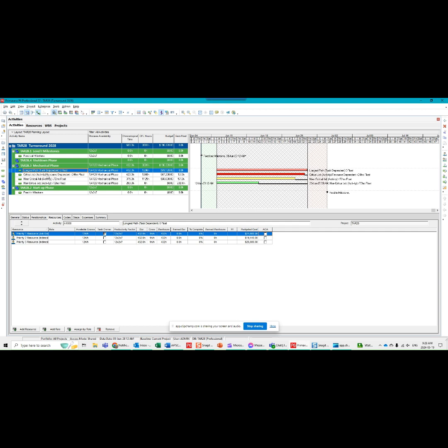When I get into critical jobs, I'm talking about any activities or jobs with less than 24 hours of float. And here I'm going to make this red. And I want this to automatically turn colors in the Gantt chart according to the filters I apply and the method that I have applied for calculation.